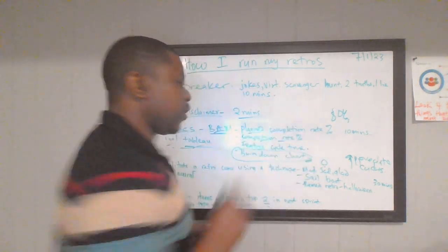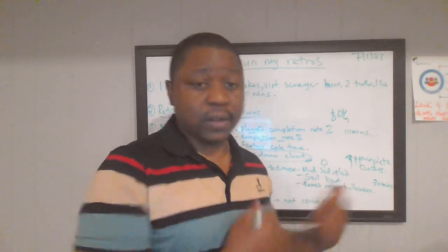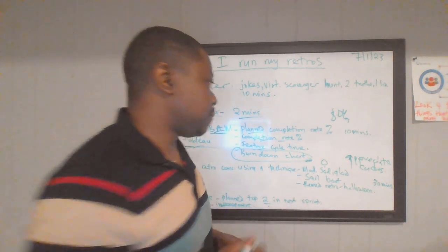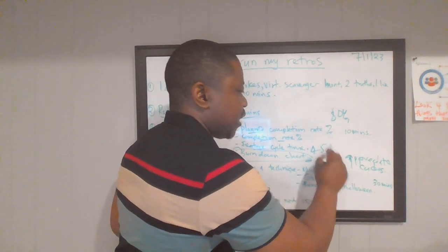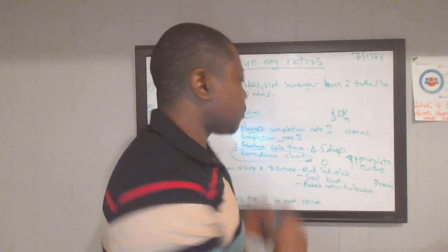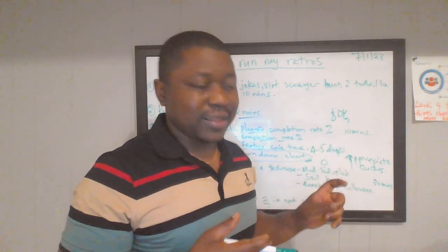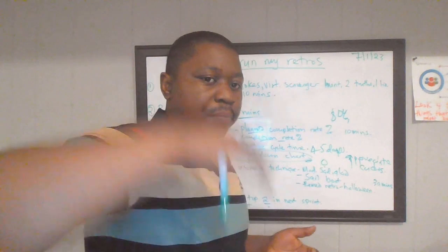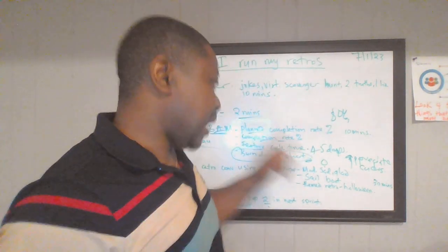Then feature cycle time is another metric that we pull up, and my organization's leadership looks at this as well. So as a policy, we decided that 45 days is the max number of days for an epic to exist. These epics are just big user stories, right? And we usually have each user story linked to an epic. So as we're working user stories, we are increasing the completion percentage of that epic.